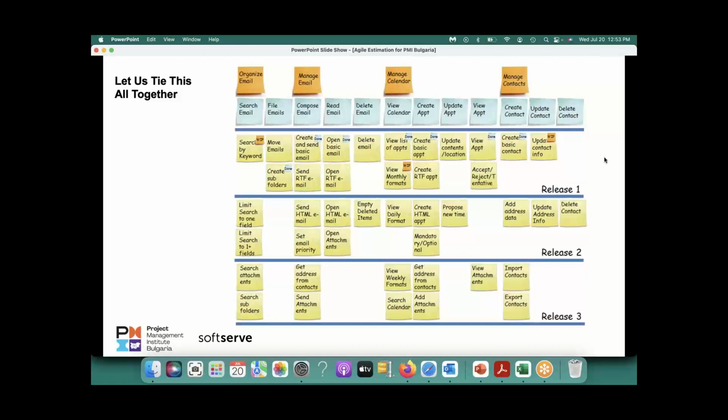If they have an agile mindset, or you coach them to have one, they say, okay, I have $500,000 and 6 months, and I would like to develop this system. I would like to get this system developed so my users start using a new email system. I have 6 months and $500,000. That's fine. Whatever team you can put together for $500,000 for 6 months, let's say it comes to 10 team members. So you have your team, that is the cost, and time is 6 months.